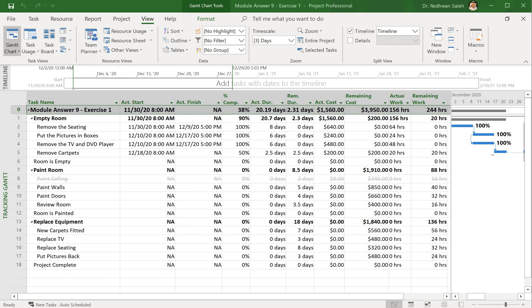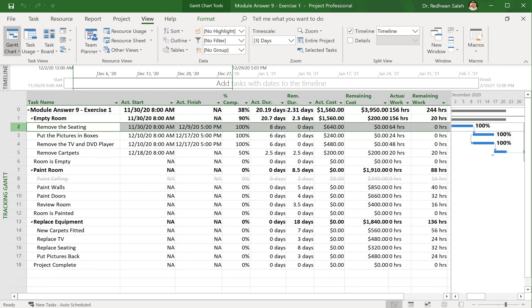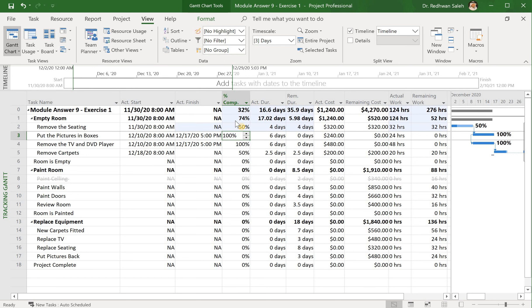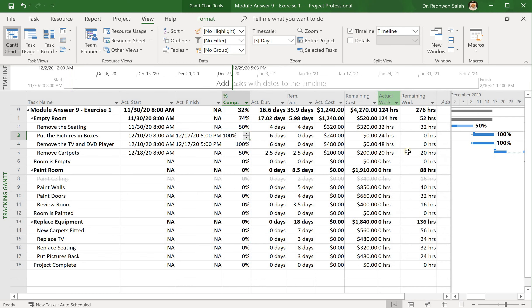I hope you successfully finished your exercise. Let's see how we're going to do it from my side. If I go to exercise number two, I will change this one to 50% instead of 100%. And now you can see that I have 320 allocated to my task and 250 remaining.